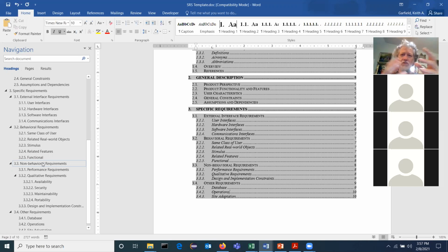And that's just a nice general natural language description. And then from there, you can say, okay, what requirements do we have to generate to prove to ourselves that this user story is done? I'm not going to ask for a complete list because we don't need a 120 or a 200-page document here. But go through the process of saying, okay, here's the user story, here's colloquially our notion of done, and here's 3 requirements that we have to pass in order to say that it's done. Does that make sense?